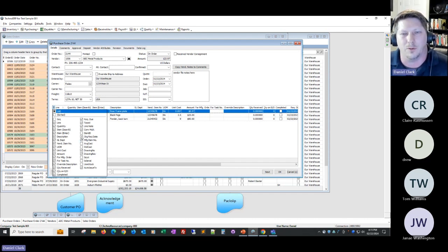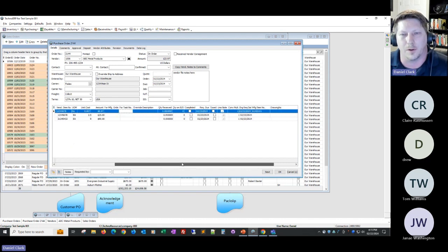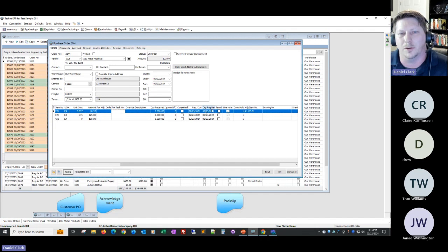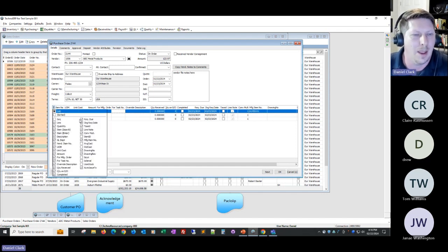One thing I want to talk about is the original requested due date. So you may need to move your requested due dates over time, but a lot of our customers still want to be able to see what it was originally, so we know what to hold them to or go back and discuss with the vendor. So we store that for you. After the first time you have these lines, then it'll be stored there, so you can always pull it up and look at it. We also give you average and standard cost.